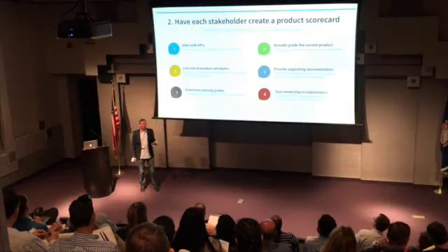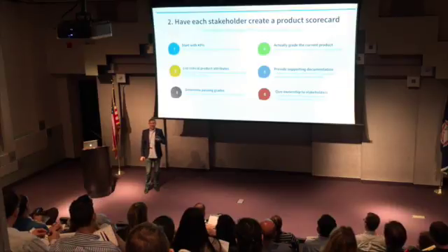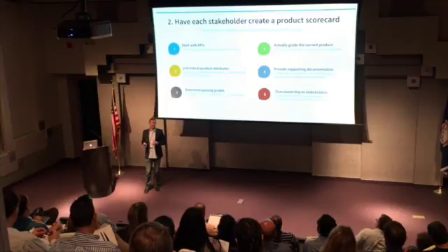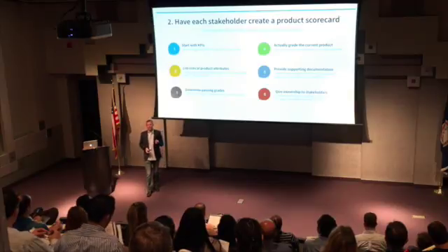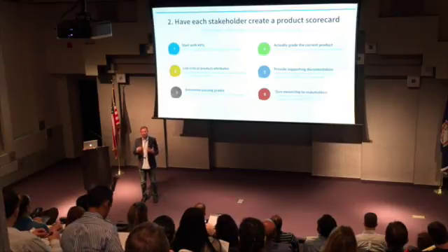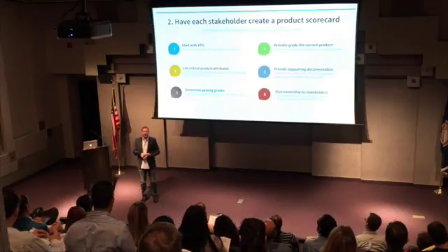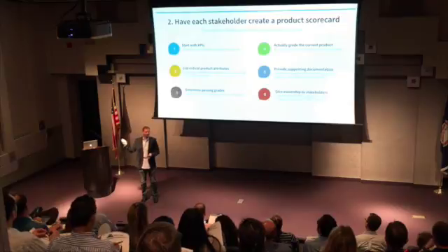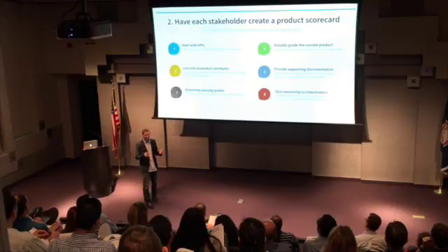The next thing I can say is, when it comes to dependencies on the product, I can maybe hit that number as is without any enhancements from the product at all. If that's the case, great, we're done. But if there is actually a dependency on the product, where in order to hit that number you're going to have some product enhancements take place, I want to know what those are, okay? And it's not that I want to know the specific features, it's that I want to know the attributes that are actually important. So if user experience is one of your stakeholders, ease of use of the application would be the attribute, not this particular feature to rework the tab structure in our web app. That's a different story. That's a specific feature, and we'll come to that in a second.